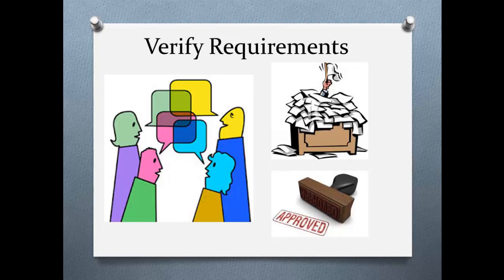That final BRD needs to be approved by the client, or the business. There should be a sign off from the business before we move on to the next stage, because we want to make sure that our client is happy and that we understand their expectations of us. If they give us something and we implement something that is a mess, that is a problem. We just want to make sure that what we are implementing is the same thing they are thinking of. That's the reason we want to have a sign of approval.